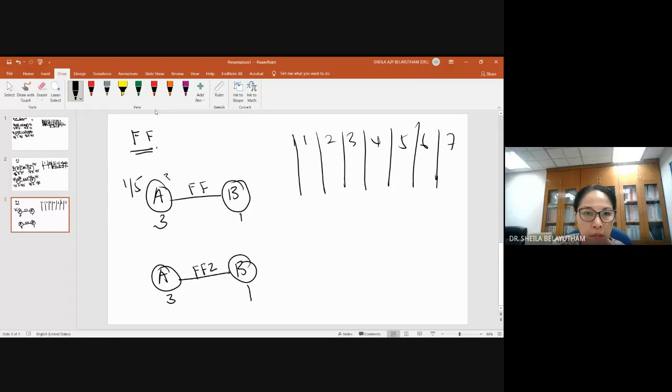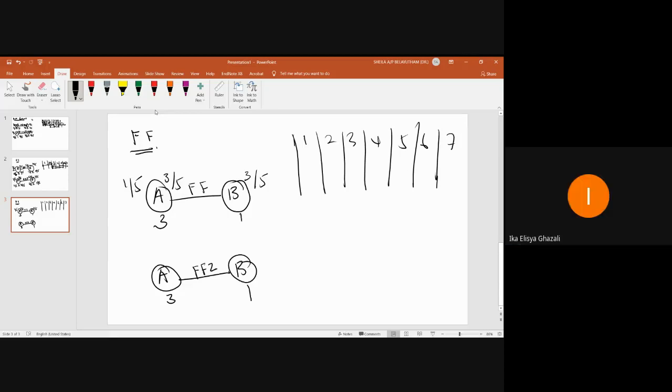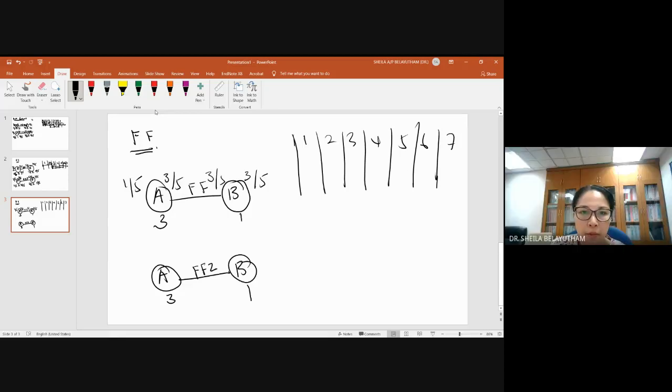Okay, 3rd May. So for the finish to finish relationship, we will ascertain the finish. When will A finish? 3rd also. And if B finishes on the 3rd, when will B start? 3rd. So in a finish to finish relationship, A finishes on the 3rd, B will also finish on the 3rd. Okay, so finish on the 3rd here, 1 working day. It shows the start of the 3rd.